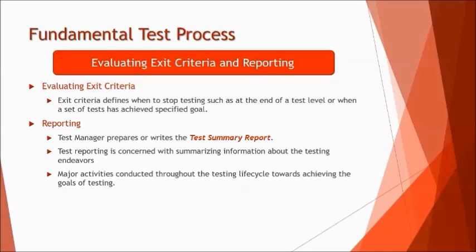But at any point of time, if you think there is something more which is required to be covered, for example, a risk with a higher severity is yet to be covered, and you have enough budget and time to conduct that, then you can modify the exit criteria and continue the testing further. Exit criteria are created as a part of test planning, but by the time you conduct everything, you may realize at the end that something more has to be done beyond the schedule to give a better confidence and quality to the market.